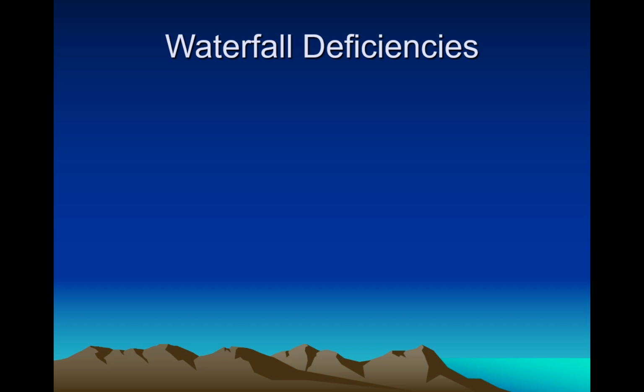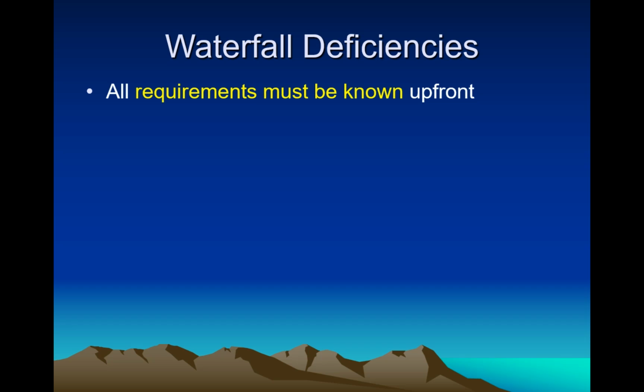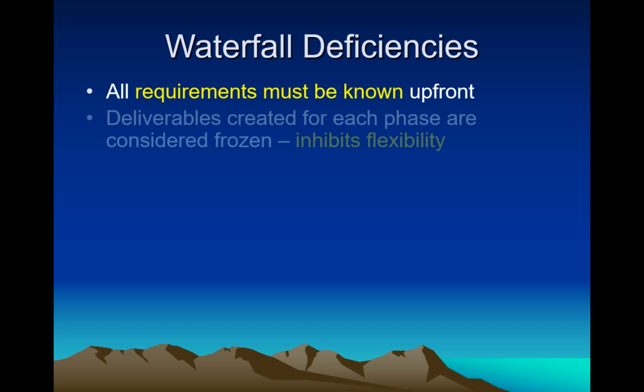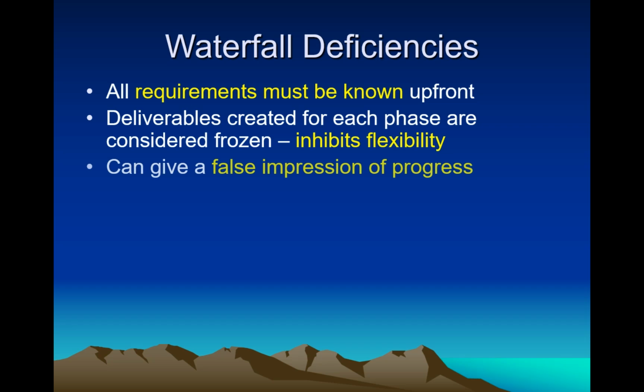Let us go to the deficiencies or disadvantages of using waterfall model in software development. First, all requirements must be known upfront. Second, deliverables created for each phase are considered frozen, inhibits flexibility. Third, can give a false impression of progress.